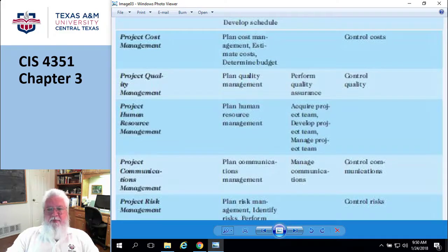So we have a pre-initiation phase, okay? Pre-initiation phase is basically the selection process on what it is you're going to work on. I wouldn't really call that a phase of the project because you don't really have a project yet. So what most organizations have, I ran a shop similar. I ran a productivity improvement shop, and we had a list of all the people. We polled the people and said, "Hey, what projects do you want?" And so they gave us a big laundry list. Well, there's no way we could do them all. It was huge. It had 100 items on the list. So what we had to do is go through the list and say, "Aha, that one looks interesting. Ooh, that one has a lot of potential for improvement or productivity."